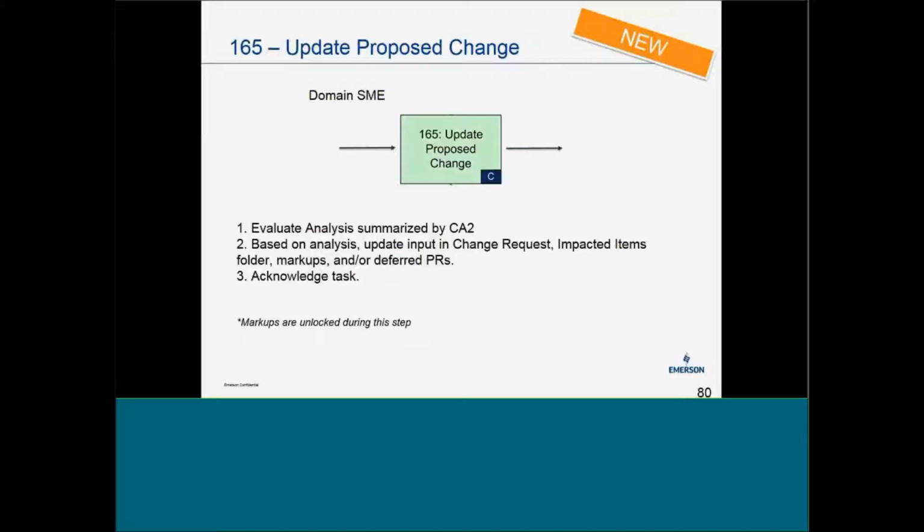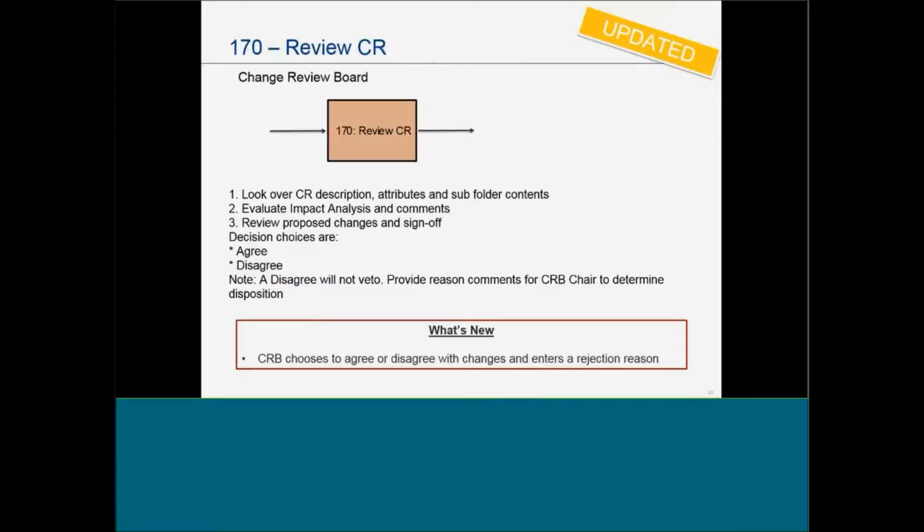So the markups are unlocked during this time. The SME can update the markups, update the change proposal, and then advance it on to the change review board. The change review board reviews the change proposal, reviews the markups, reviews the CR, and they communicate their agreement or disagreement